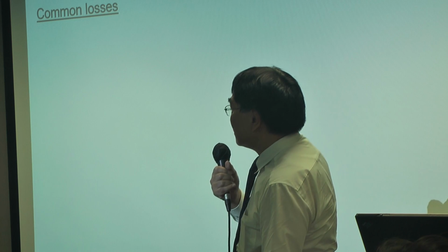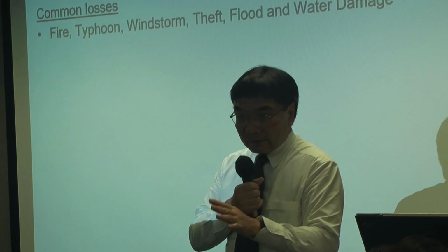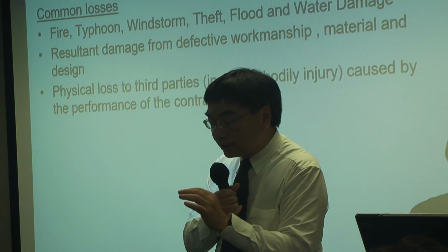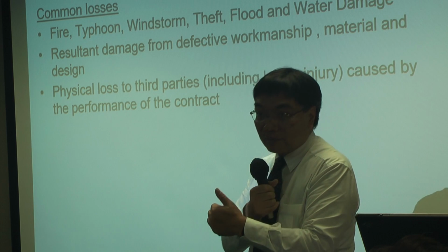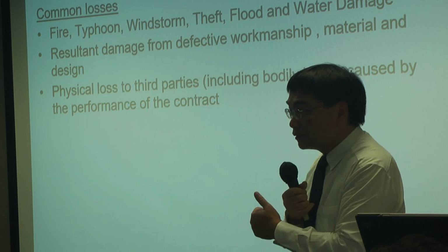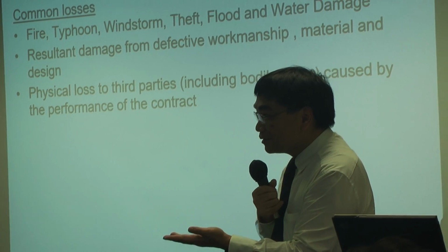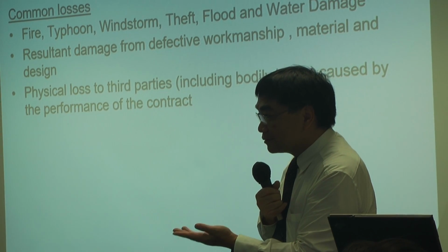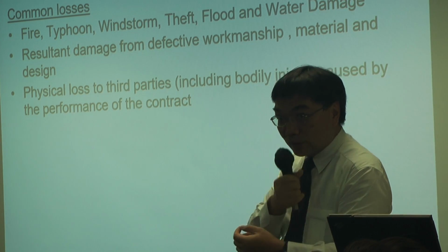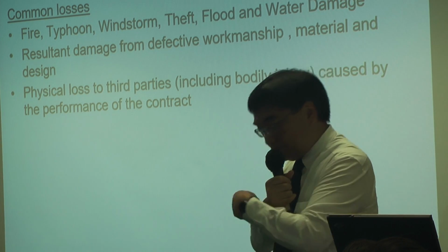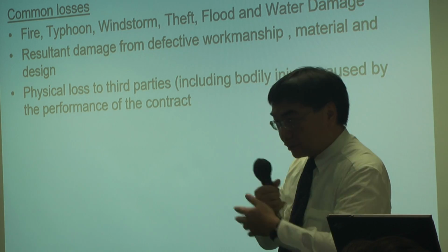So the normal building construction site losses are fire losses. I handle quite a number of big fire losses in construction sites. Normally this is caused by the disposal of cigarette ends, and then it causes a big fire.